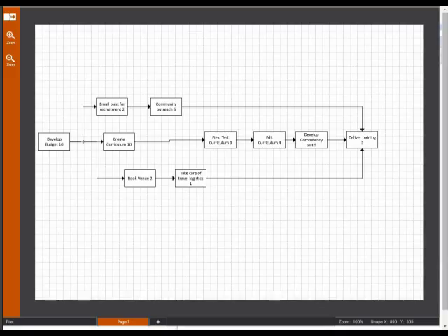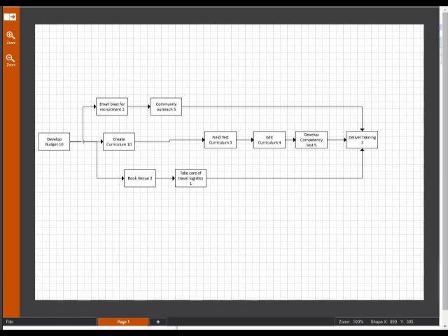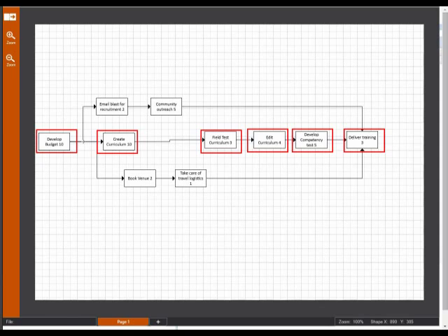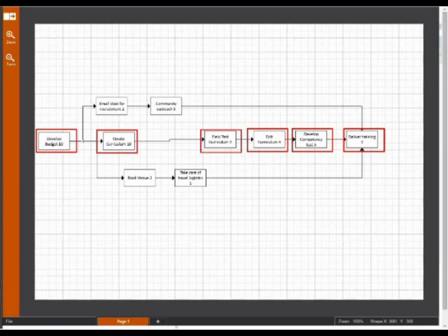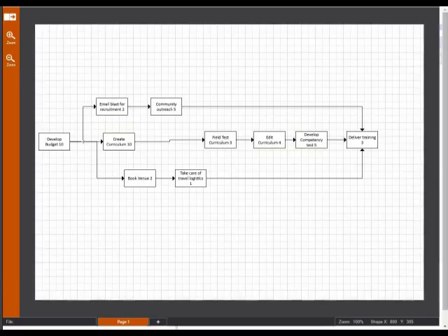This diagram allows me to both understand order of activities with dependencies, indicated by the arrows, and also my critical path. As you begin to add and change activities throughout the project, your critical path will inevitably change. Thus, make sure you're using software that calculates that for you. It will make your life easier in the future. Most importantly, I have added durations to my activities, indicated by the numbers, after considering resources and task demands.